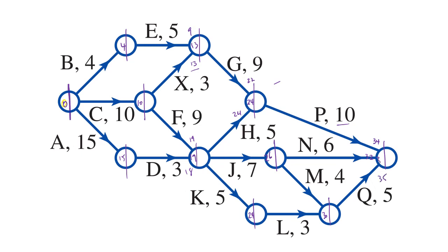So we can now determine the earliest completion time for the project, and that's 35 minutes. So earliest completion time equals 35. Might be minutes, might be hours, might be days, might be dollars, might be kilometers of road. So let's now look at the critical path. The critical path of those activities, if you delay, delay the whole project. So we'll go there, there, there, here, and here. That's our critical path.